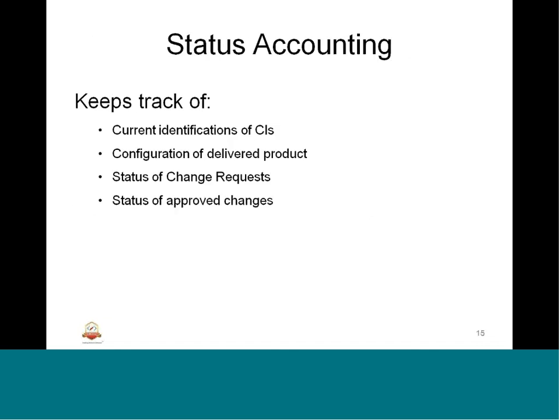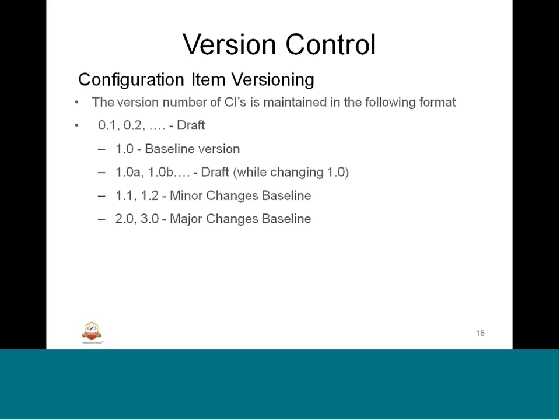Status accounting keeps track of CIs, delivered products, when delivered, what changes occurred, and what change requests were approved. Configuration item versioning is important: we identify draft versions, baseline versions, minor changes baselines, and major changes baselines. Drafts are usually in fractional increments like 0.1, 0.2, etc. Baselines are whole integers like 1, 2. Intermediate versions keep track as 1.1, 1.2, etc.